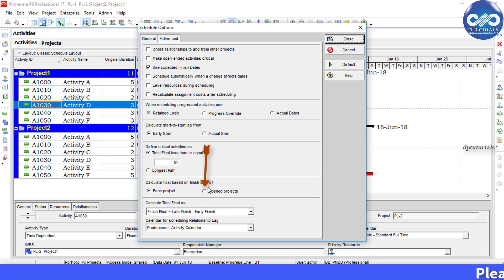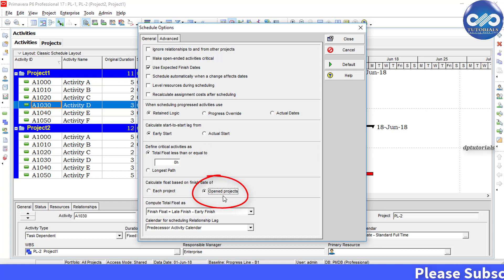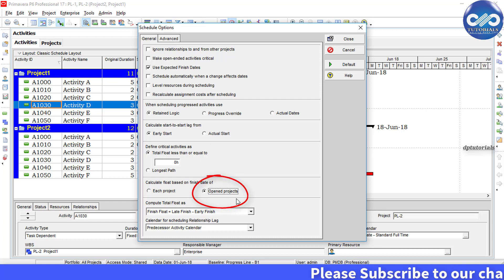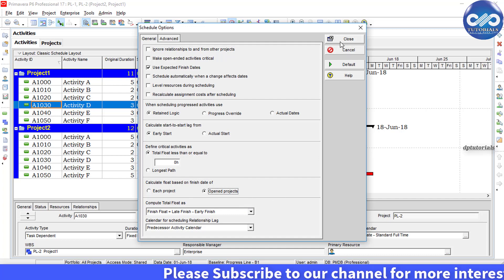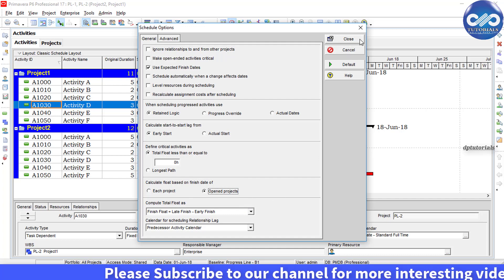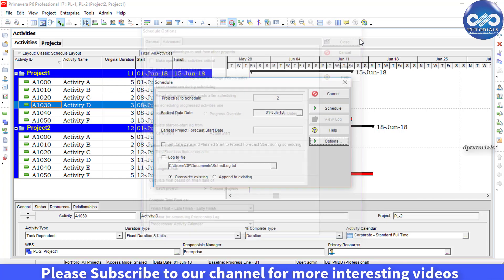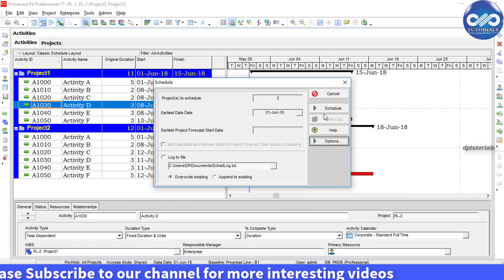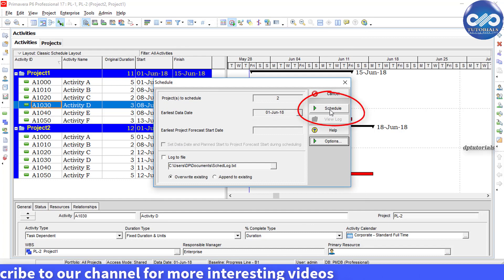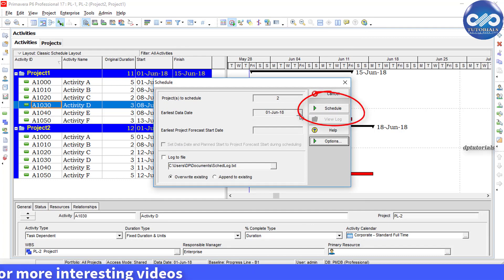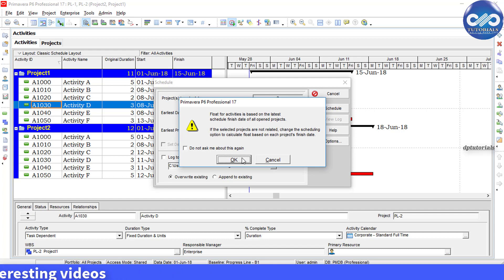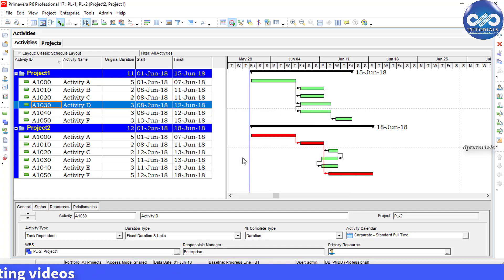second option called 'Opened Projects'. So rather than 'Each Project', you need to select the radio button 'Open Projects'. Now click Close and click on Schedule to run the schedule. Once it is run, you will